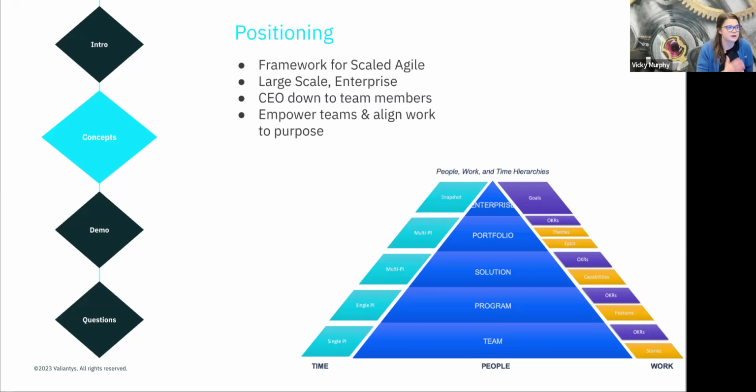Really, whenever we are talking about working with Jira Align, we often go in the people, process, tools order, where we are starting to implement some form of our process before we start to implement the tool. In fact, we find it typically works best whenever we have been through one program increment, or quarterly increment, you may call it, from a process perspective before we start implementing Jira Align. That just helps us understand the process better. It's a little less change on your end users all at once, and it can help make decisions about configuring Jira Align a little bit easier because you already have some of that process under your belt.